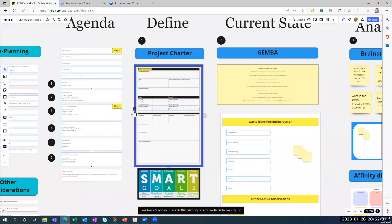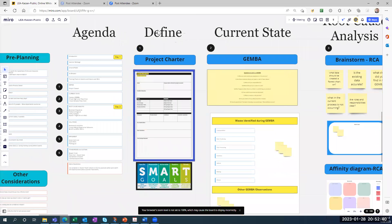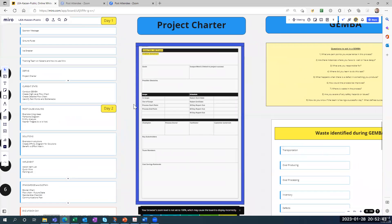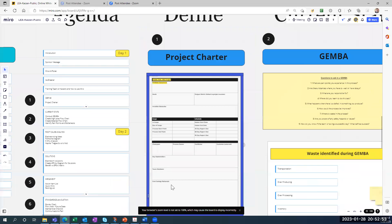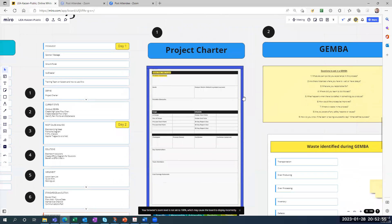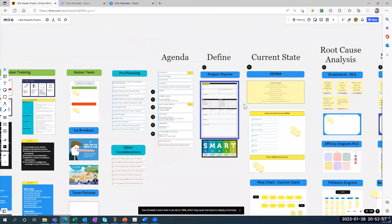Your first step is to complete the project charter, found under the define section. It's a typical project charter where you start with a problem statement, goals, output metric, and obstacles. You put in the key stakeholders, team members, and cost savings rationale.